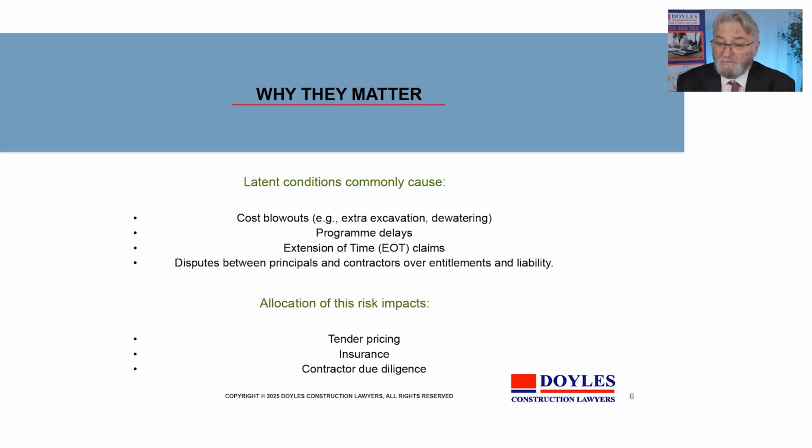Why they matter is because latent conditions are traditionally expensive. To remove something that you've planned for, that you put in a tender for, that you've recruited people to consider and plan for, is usually effective and efficient. Additionally, you've had the chance to subcontract the removal of the condition you planned for. The subcontractor that's been selected is usually the most efficient and qualified and talented, and he's had available in his work schedule to fit that job in.